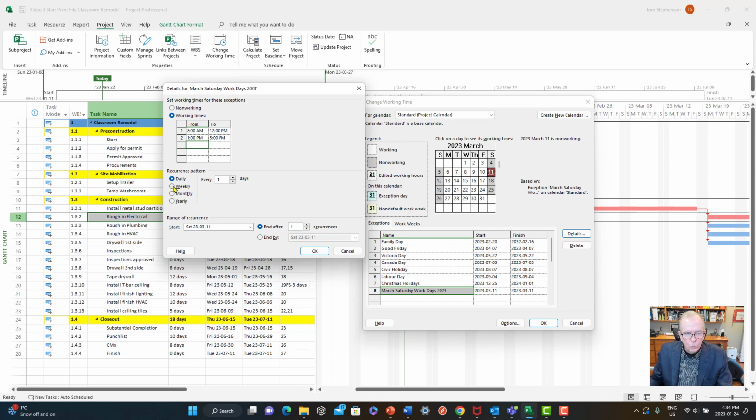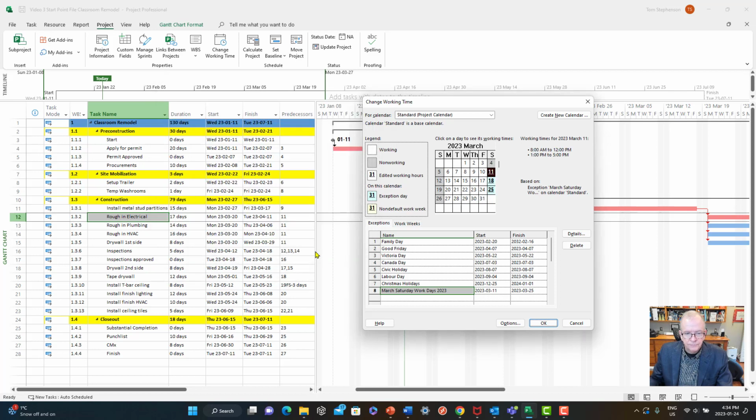I'm going to say weekly on Saturdays, right? I could make it Saturday and Sunday if I wanted to. And I'm going to say for 3 occurrences. I said the 11th, the 18th, and the 25th, and it's showing me now that I would finish by the 25th. So I'm going to click OK.